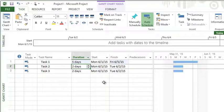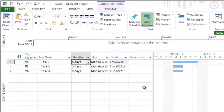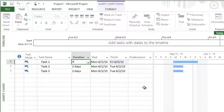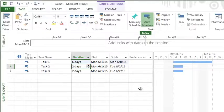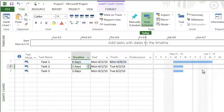One other item with days is if I put in six days for a task, you'll notice on my Gantt chart that is occupying eight days because currently in the schedule no work is done Saturday, Sunday.